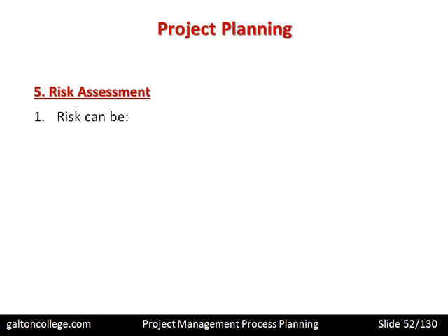Now, risk assessment. Risks can be internal or external. The environment can have an impact on projects. Costs of materials may arise or vary. There may be shortages of particular skilled labourers or labour with particular competencies. It may be internal. It may be that the project will have to be fitted in around a very busy operational schedule that the business is undertaking, and that it just has to be programmed as and when it can happen. And that can lead to frustration, and could eventually lead to the death of the project because it was not adequately resourced in terms of personnel, time, or even the budget.